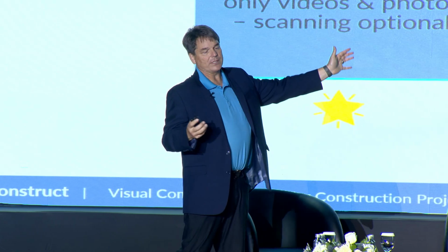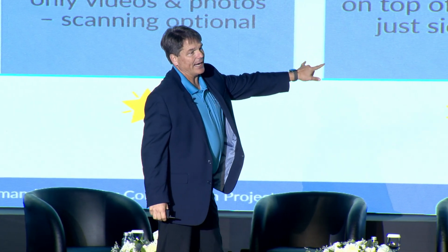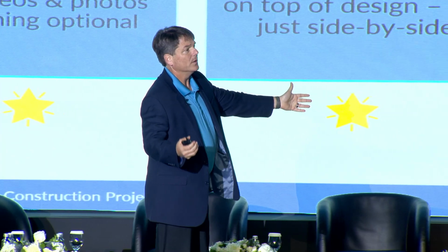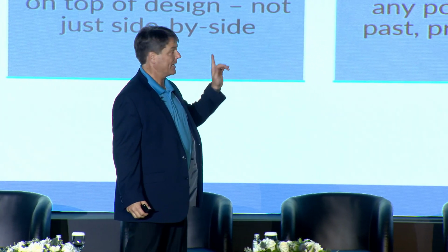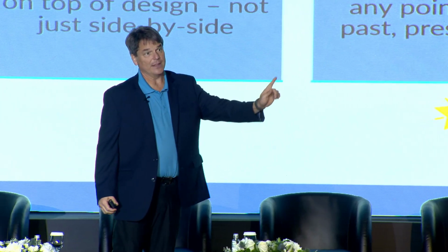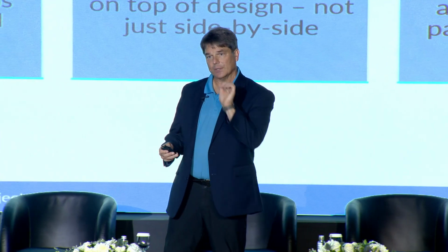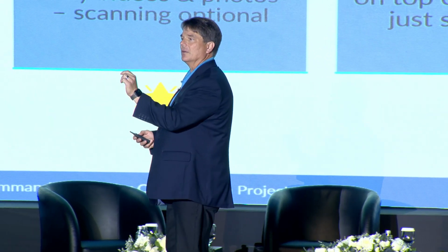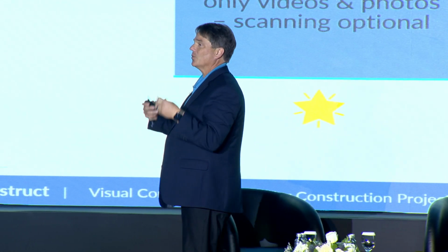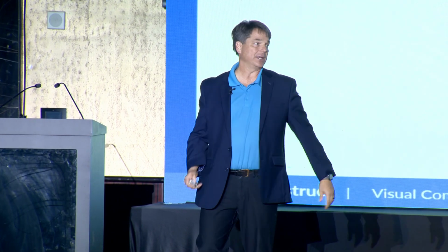And then the monitoring, what we do together, this makes it 4D for the geeks in the room. So this is tying together schedule. For example, with our Oracle partner, we're tied to P6. So this is at any point in the past, present, and more interestingly, the future. You can do 3D look-aheads because you know what's there inside the Visual Command Center, and you know what should be here thanks to your schedule. So you can really help the planning teams by bringing that P6 to life in 3D.